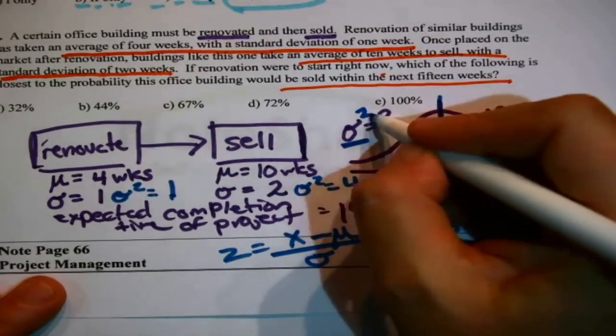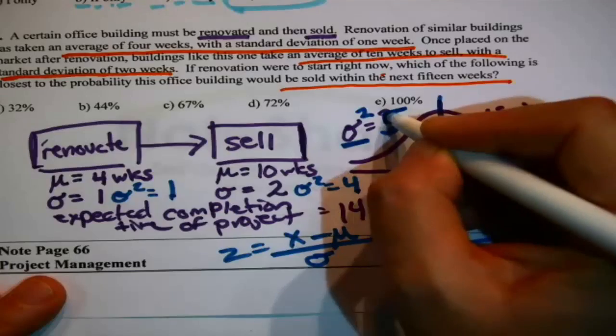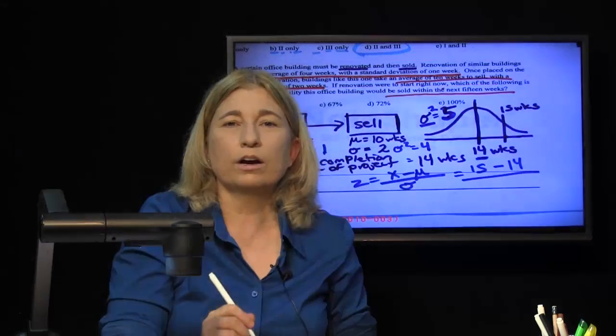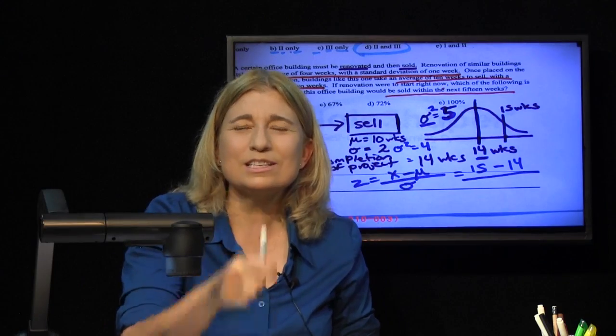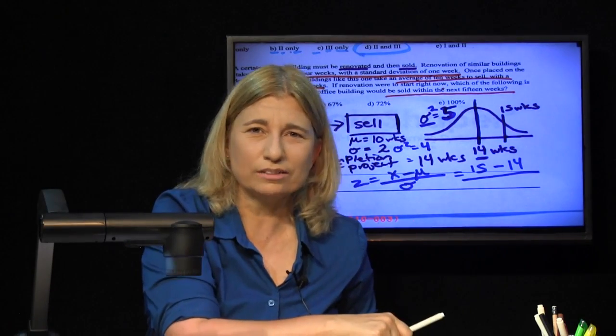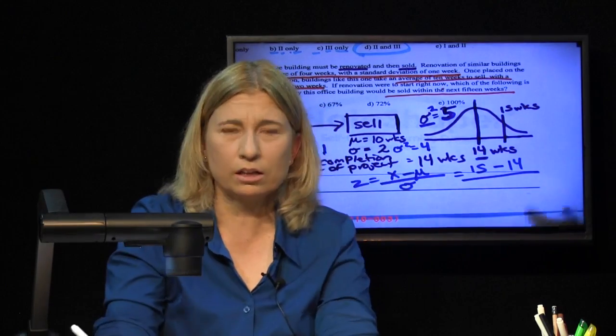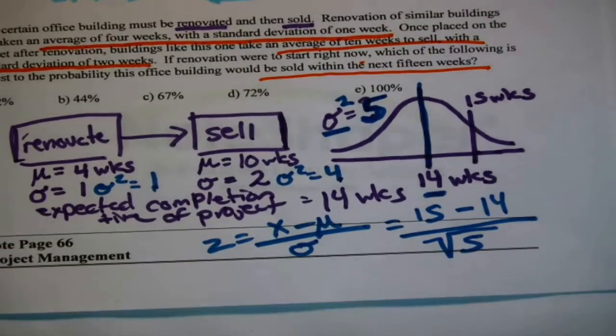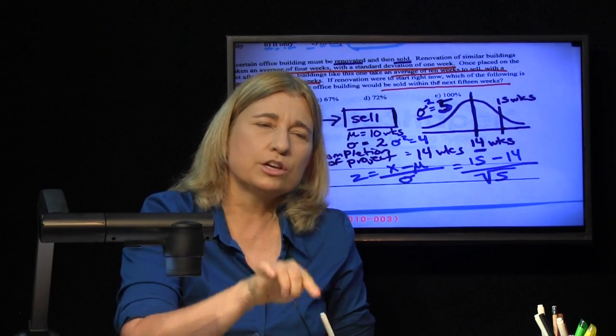Oh, all right, so the variance here is 5. You say, great, all right, I put a 5 there. Okay, in the z-score, you always need a standard deviation, which is to say, close, but be careful, put the square root of 5. That gets you the standard deviation in the path.